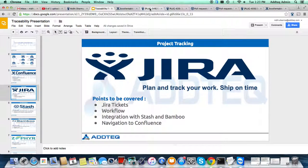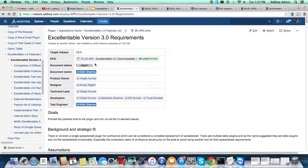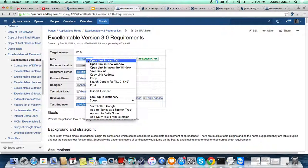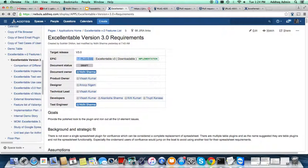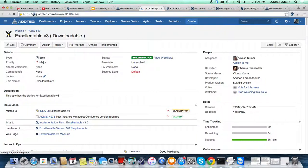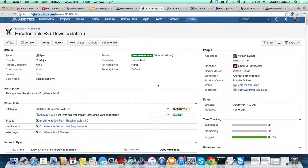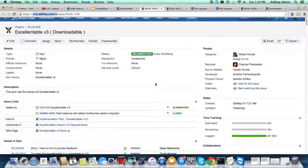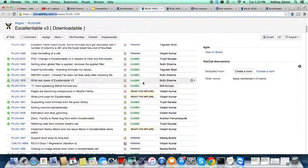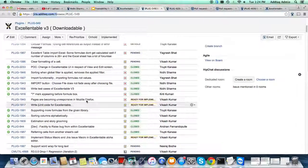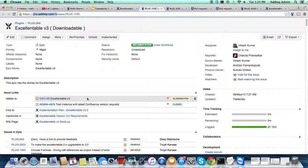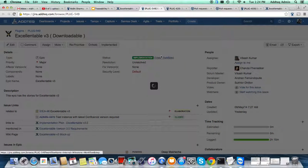Getting back to Jira — if you go to the Confluence page, you can see one epic ticket linked there. Once you click on it, it will take you to Jira. An epic represents one feature, and one feature can have multiple stories. All stories can have test issue types or test cases. If you look at the epic workflow...